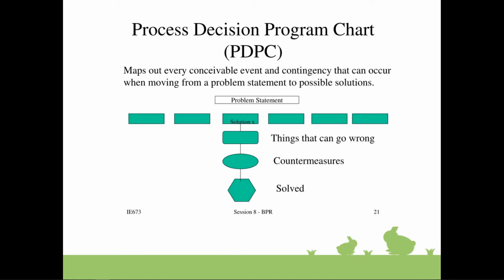So first you create a tree diagram of the plan, including objectives, main activities, and tasks that should be completed under each activity. And then you take the tasks and brainstorm what could go wrong with each particular task. If the consequences of the problems identified are insignificant, leave them out. Add only the significant problems related to each task and put them below the tasks list on the diagram.